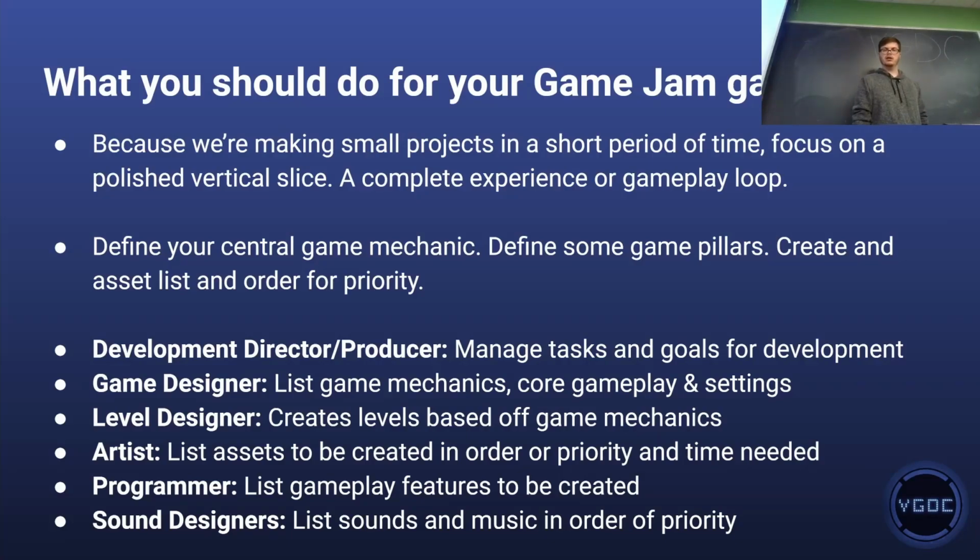Level designer, incredibly important, especially if you have something like a puzzle game or a 2D platformer, where the game's mechanics heavily rely on interactions in the world. Being able to put someone on that so people can develop the core mechanics of the game while levels are also being developed is a good way to make sure you're not bottlenecking yourself and waiting for programming to be done before putting in levels, even if some of those levels might not translate directly.